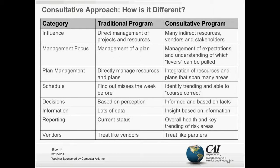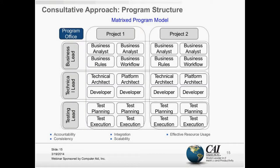This is a model I've used on everything from $5 million projects to $500 million projects: a matrix model where you have vertical projects focused on executing a particular delivery, and then horizontals that span across those projects. This webinar is focused on program management — a collection of projects under a particular program — but we can apply this to work streams under projects as well; the model is scalable that way. The horizontals are domain leads who ensure consistency and standards across those areas.